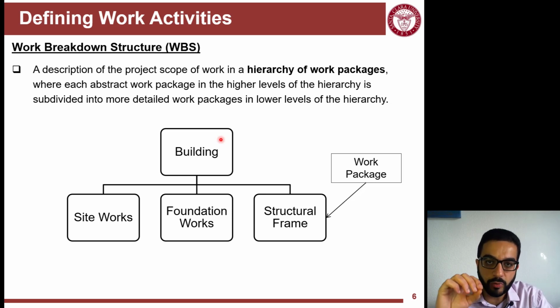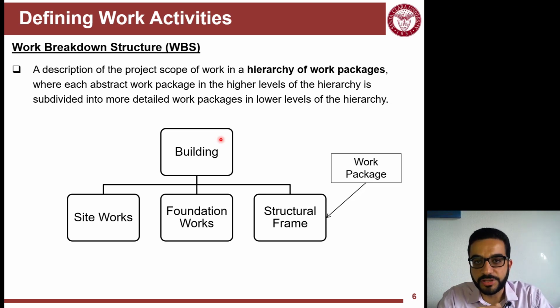And at the end of each branch is one of the activities in your activities list, and it has to satisfy the three conditions we mentioned before: discrete continuous duration, the assignment of responsibility, and having a measurable quantity.